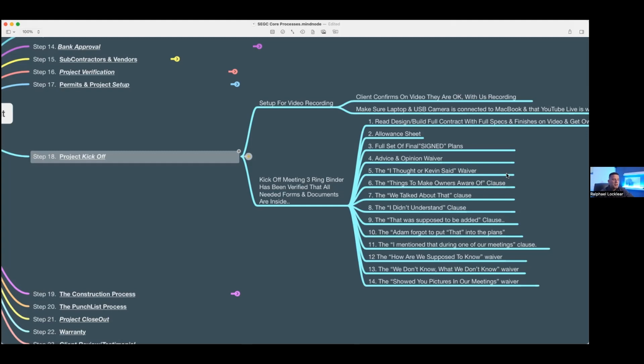But if we don't keep that in check, what's going to happen is that plumber or that electrician or the HVAC guy is going to say, well, hold on a minute. The moment I tell him and his guys to stop and they're sitting there idle, it becomes a problem. It's costing their own money. Of course it is. But a lot of times homeowners don't see it like that. So you have to explain this to them up front.